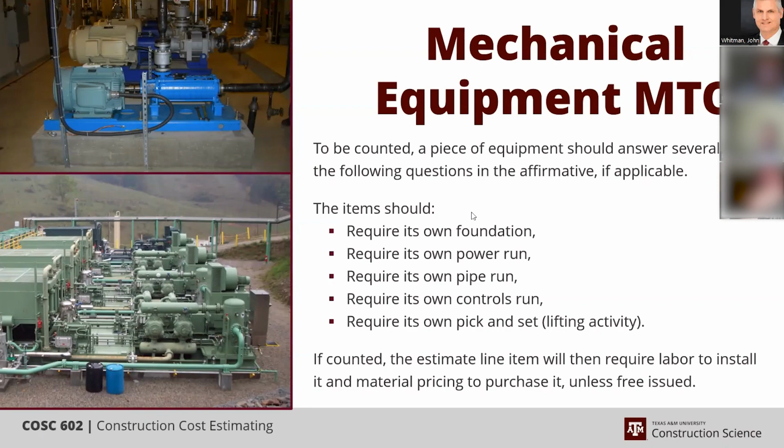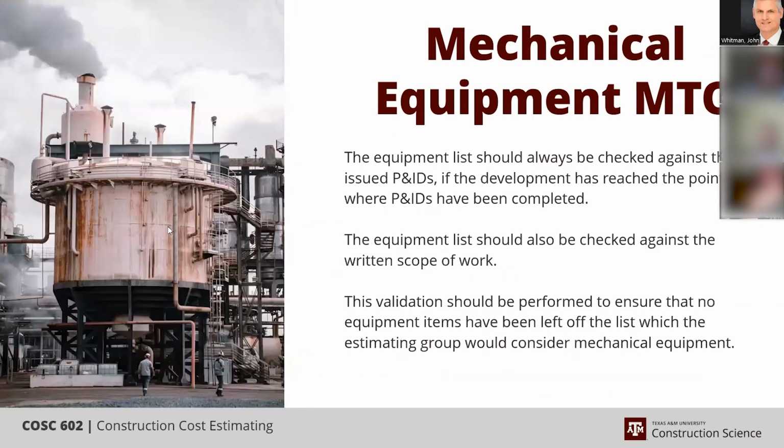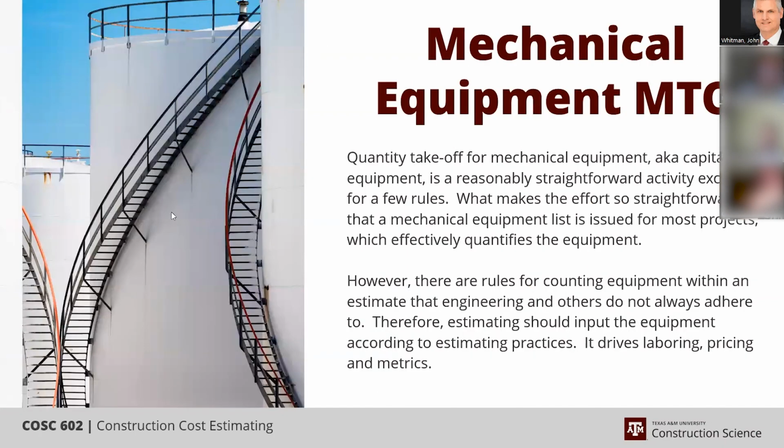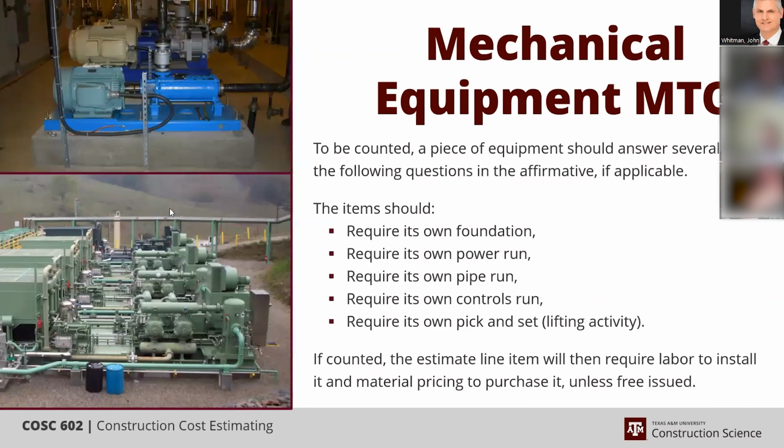The reason why you can't say this for all of them is if you go back to this tank right here, this tank doesn't have any power. It's just a tank. But it has its own foundation, and it has pipe running to it, and it has instruments on it. And so it's its own item. It needs to be counted.